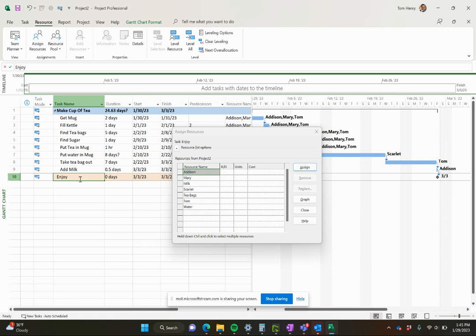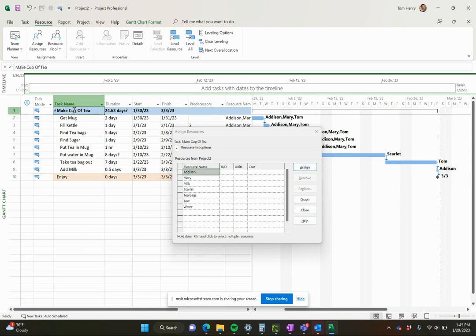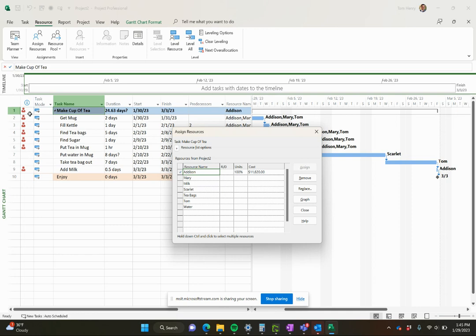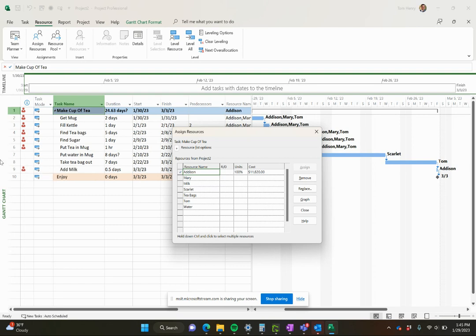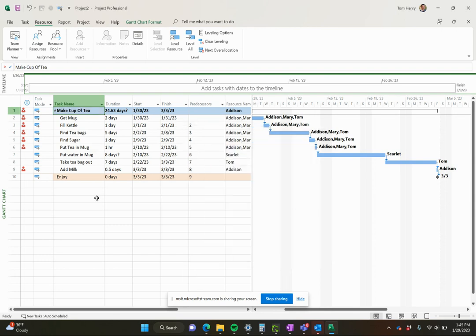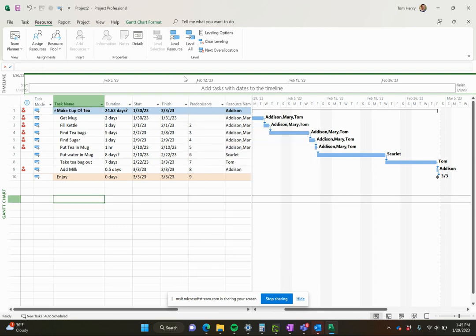You should never assign resources to a milestone because there's no work to do. It's just a moment in time. You should also not assign resources to summary tasks because technically they're then assigned to every single task. For example, if I assign Addison, everybody's over allocated. Addison will be over allocated on every other task that she's working on because by default she's assigned full time to that task for the duration of that task. If I assign her to the summary task, she's then assigned to all of the tasks. The next thing I want to do is manage my project.